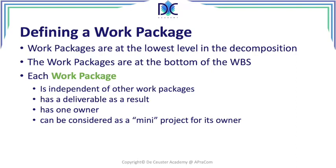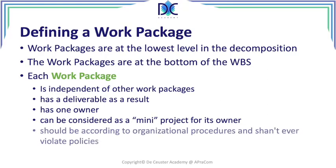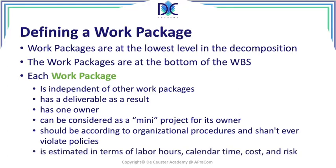For example, when dealing with the central heating system, you have different items that you can further decompose that work package into activities that you need for detailed planning. It should follow organizational procedures and should never violate policies. It is estimated in terms of labor hours, calendar time, cost, and risk.